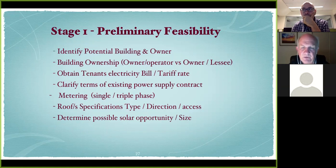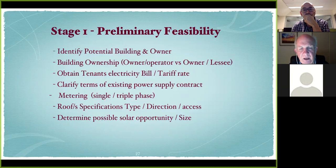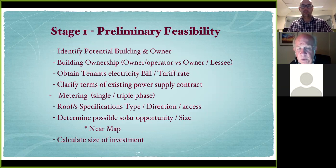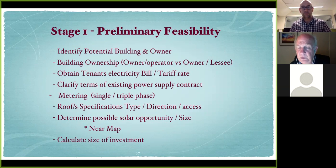BSG uses a program called Nearmap — a commercial subscription product. They zoom in on the nominated building to look at the roof and determine how many panels they can place, whether that's a 10, 20, 30, or 50 kilowatt system. This starts to reflect the cost of their investment. They also use the ATA Sunulator to assess return on investment and factor in how much sunlight a particular roof gets depending on its north, east, or west orientation. They run it through financial modelling including the Frontier Impact modelling and their own calculator, and they need to be aware of GST impacts — especially if operating as a not-for-profit.